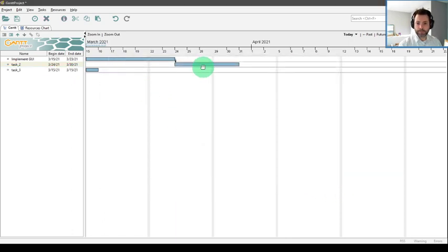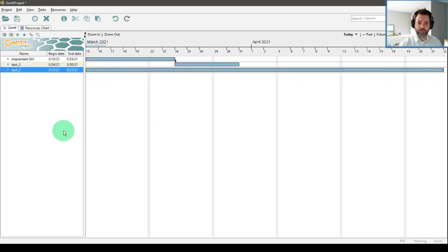Now, poor Mako can't do his job until the 24th because he's waiting on me to deliver my work. And our Ganzatron, you're just going to be working forever. So, simple Gantt chart, right? We see dependencies, we see who is attached to what. If I look at my resources, I can very quickly see when my team is busy, when they're overloaded, when they're not doing anything, right?